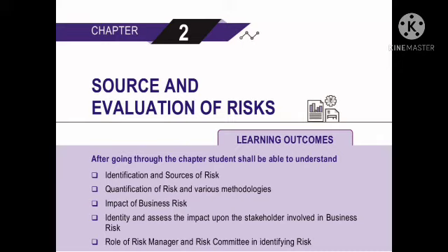A stakeholder risk analysis is essential so that each stakeholder, be it an individual or organization, is aware of the risk perception. Stakeholder risk analysis means identifying the stakeholders, types of risks, extent of risks, levels of stakeholder commitment, and degree of influence. Risk impacts varied stakeholders and is multidimensional. Common belief is that risk only has financial consequences. However, risk has non-financial consequences as well, and the primary non-financial consequence is loss of confidence.